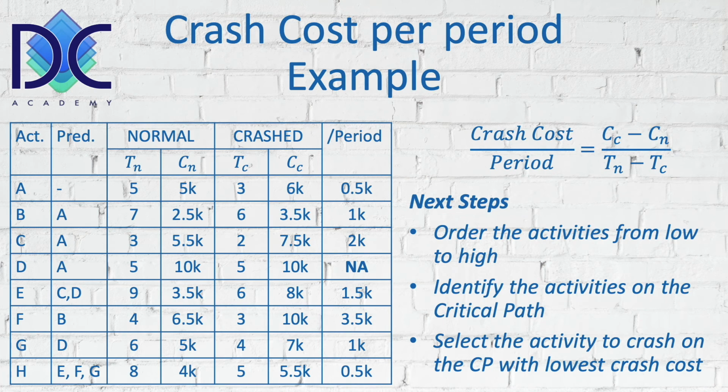Here you have to be very careful, because we may start with one critical path and start crashing. We may have critical path convergence, which means that the slack of the non-critical paths is reducing. They come closer and closer. At a certain moment, the critical path can change, or we may have two critical paths. And in order to crash the duration of the project, we have to reduce all the critical paths.